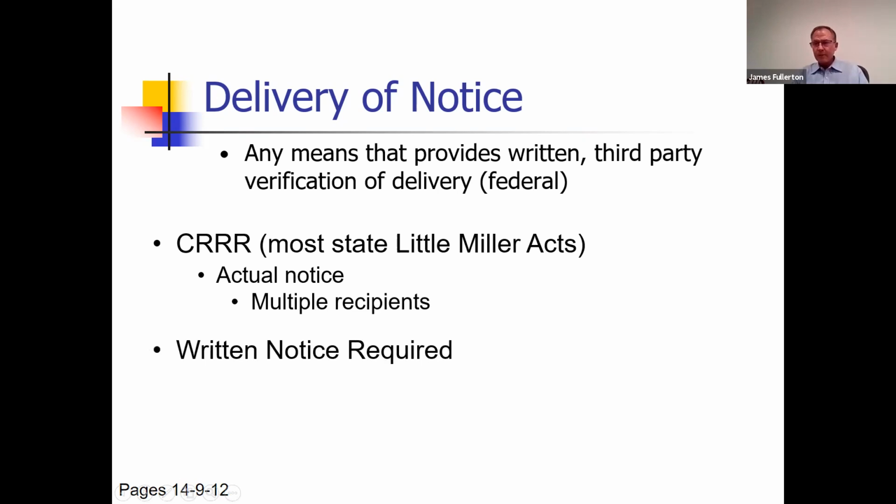It is clear that written notice is required. There is plenty of case law that calling the GC and telling them you haven't been paid and telling them you're going to sue on the bond does not do it. It does need to be written. I think that in most instances, that written notice must make it clear that the claimant is looking to the bond principal to pay.